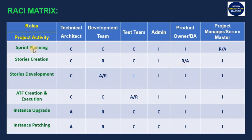For the activity of sprint planning, the scrum master has ultimate ownership and is also Responsible for doing the sprint planning. The product owner and admin are Informed. The test team and development team are Consulted during sprint planning, because both teams have to provide their timelines and availability. The technical architect is also Consulted.